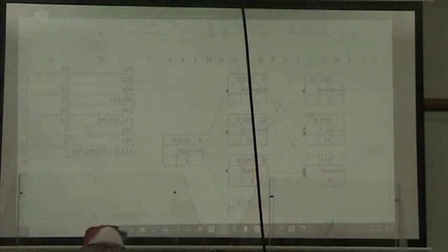Okay, well, either way it's going to be 8 right now, but what if the guys designing the bottle come to us and they say, look, can we have 2 more days or 2 more time periods, whatever it is? Then it's going to automatically update when we change the time to design the bottle.